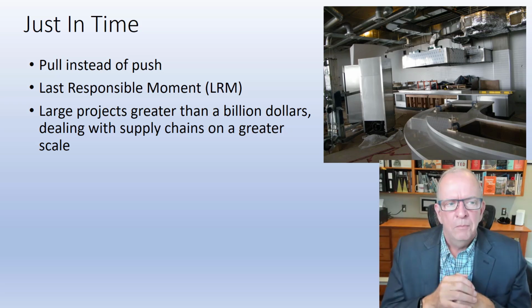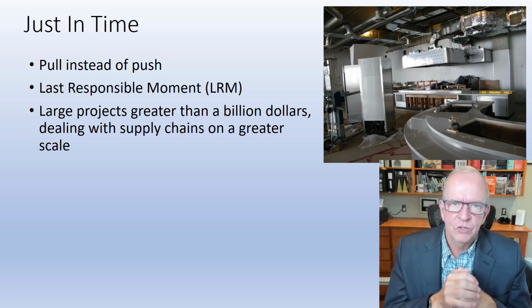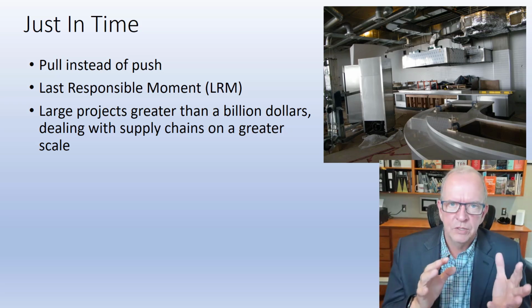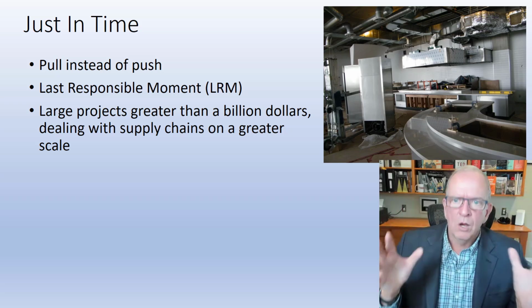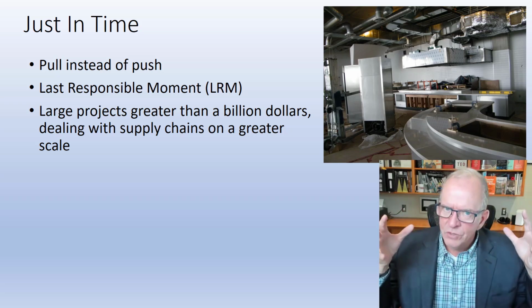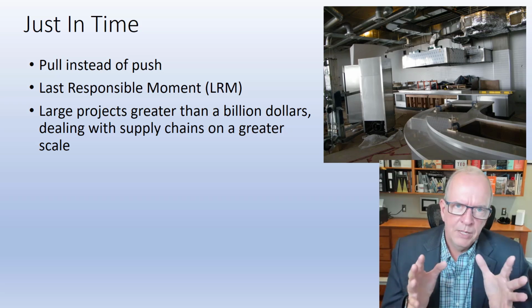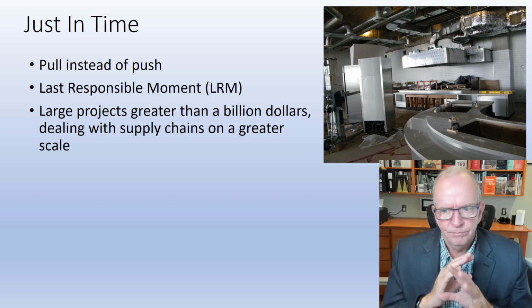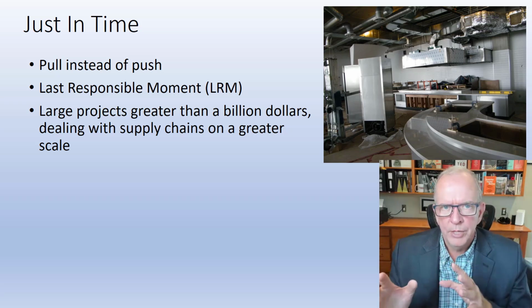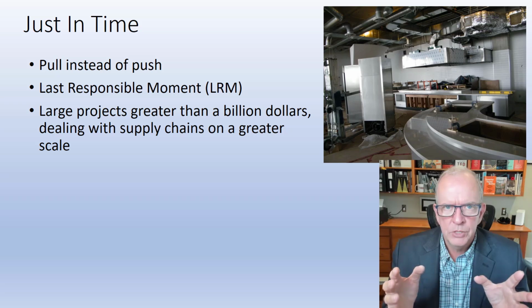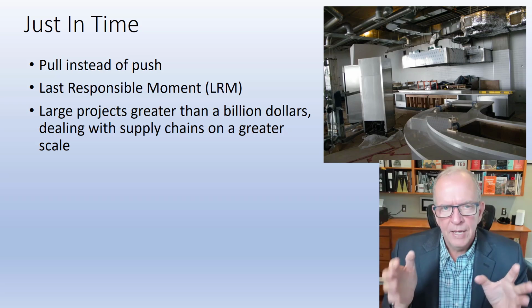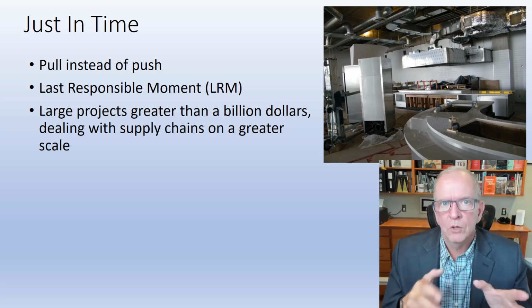It's kind of debated, but I think we're not going to have it exactly just in time in construction, because we're not like the Toyota production system where we have long, big contracts that we've developed as strong relationships as in the manufacturing sector. But last responsible moment gives you a little more leeway to say, okay, this subtrade, we work with on tons of projects. They know how we work. We know how they work. We're in constant communication and collaboration. If they say it'll be there on that day, it'll be there on that day. Well, then that's fine. We've got very good communication. That would be very close to just in time.